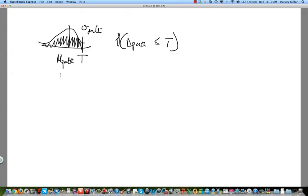So what if the path had a mean of, say, for example, I'm just going to use an arbitrary example here, 15 days, and the standard deviation was five days. So we would want to know what's that probability of achieving this. So how do we get that? This has a corresponding z. Z associated with the t is x minus mu over sigma. But what if we say, what's the probability in completing in 20 days? So now t is 20. So where we have x is really t. It's 20 minus 15 over 5. It gives us a z value of 1.0.